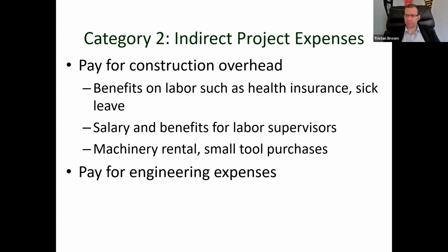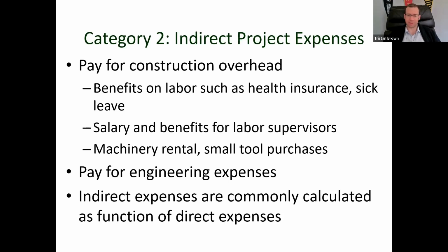And they did a great assessment, or what they thought was a great assessment. And they said, okay, this facility is going to cost about $6 billion to build. The problem was they hadn't taken into account the land on which this facility was going to be built. It turned out that there were a lot of structural issues with that land. And so there ended up being far more engineering expenses than they had originally assumed. When I say far more, this facility ended up costing them $24 billion, right? So we're talking about multiples greater than what they had estimated. So this is why we account for things like engineering expenses, because that type of thing can be a very large thing, not that large typically, but it's important.